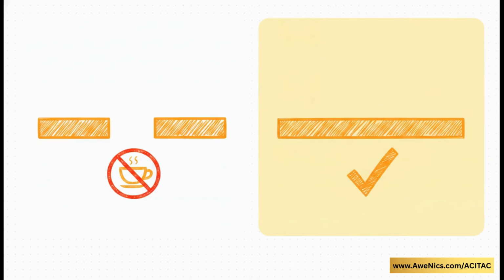Let me explain why that's a problem. The default setup uses 2 rows, Shift 1 from 8 a.m. to 12 noon and Shift 2 from 13:00 to 17:00. That represents an unpaid 1-hour gap.